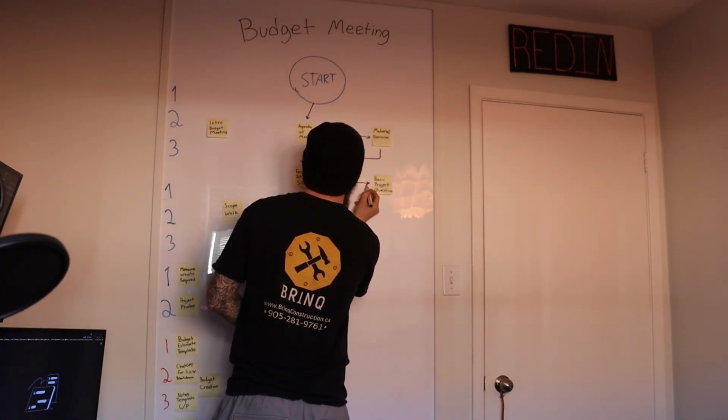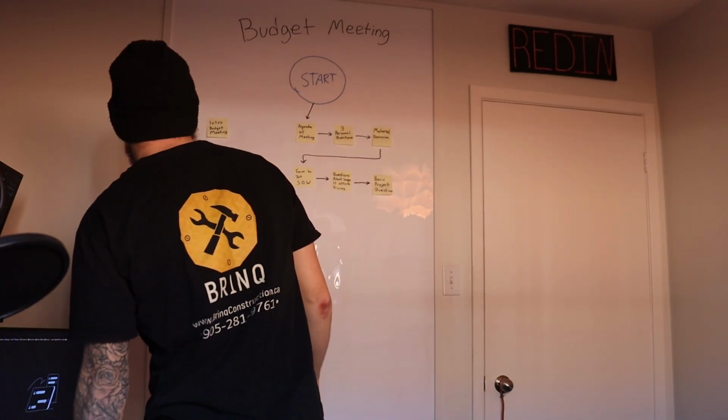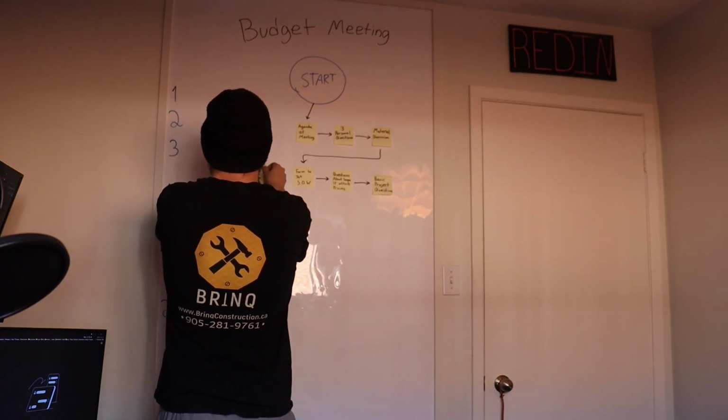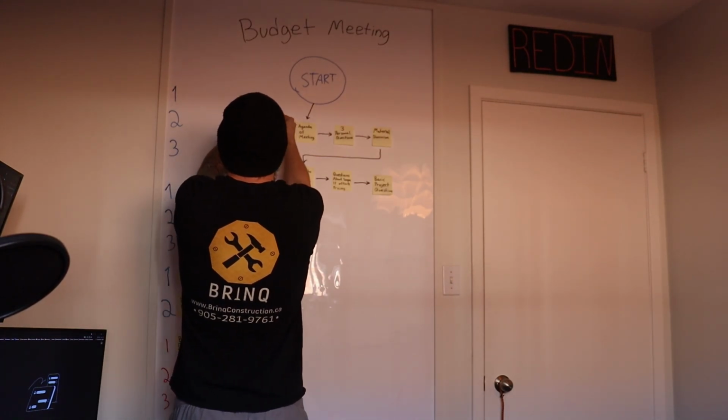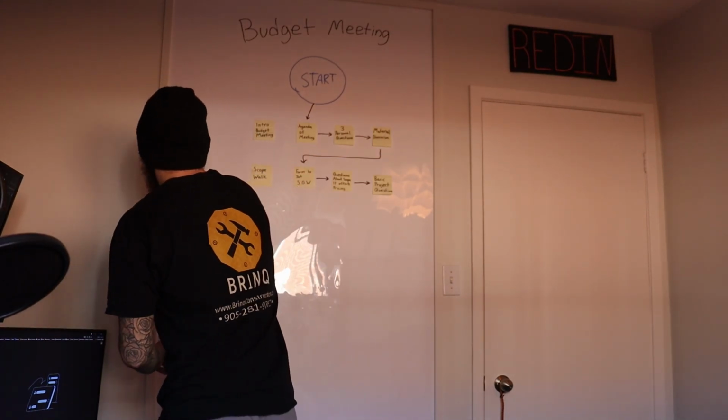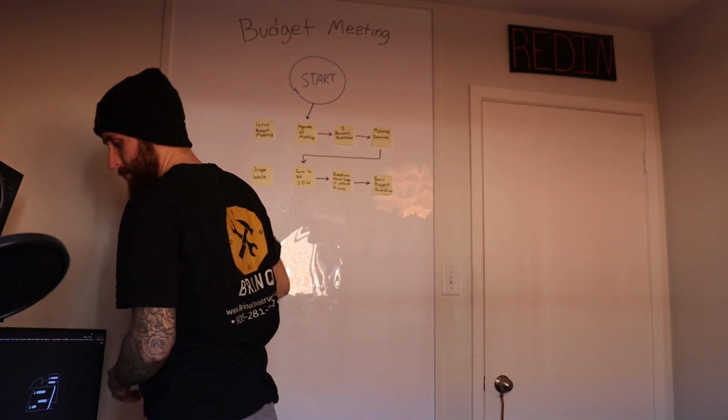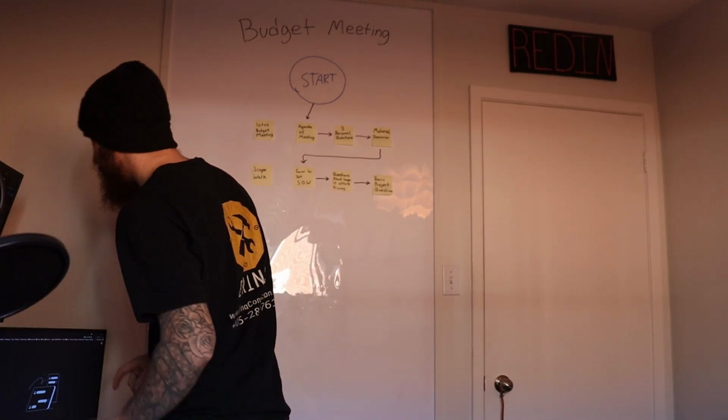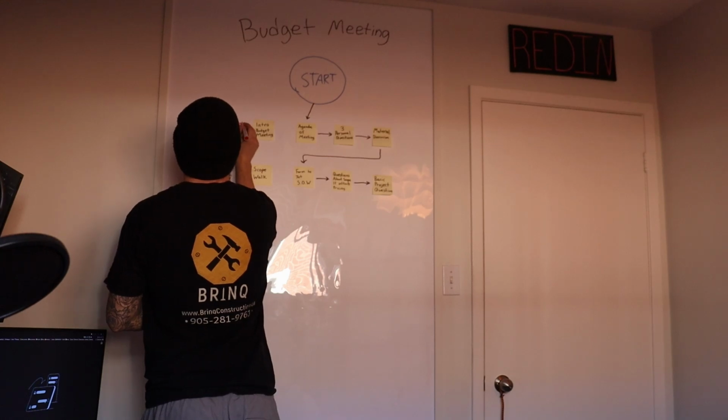Now, as we go through the items, if there's something that they have selected, such as kitchen countertops, well, we want to make sure that we ask the question of what type of material that countertop will be, because that will affect the price. After that, we finish off with some basic questions such as garbage disposal, furniture moving, floor protection, and stuff like that.